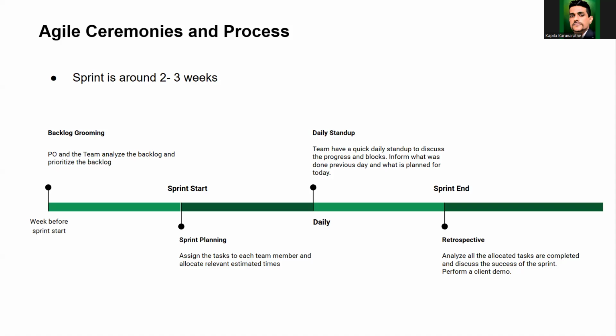Basically, a sprint is a period of work, usually 2 weeks, but some people like to go to 3 weeks. It's fine. I have noticed 4-week sprints, and in one organization I have seen 3-month sprints. It's almost like waterfall, but it's okay if they are happy with that and that is their model. There's no hard and fast rule to be 2 weeks or 3 weeks. But it's almost realigning back to the waterfall method, hence I might not recommend that. Again, it's the organization's responsibility to define your sprint.